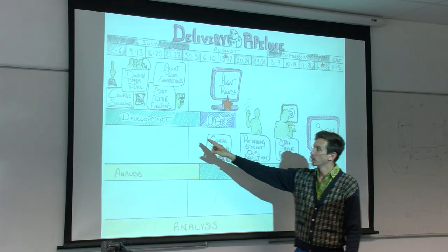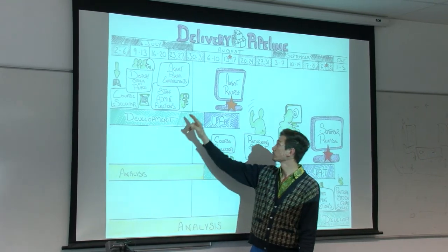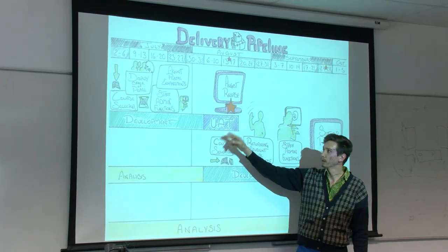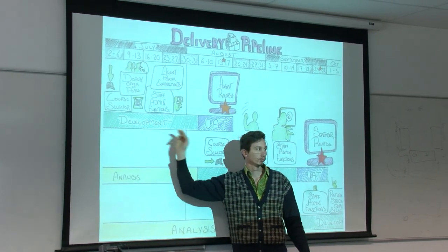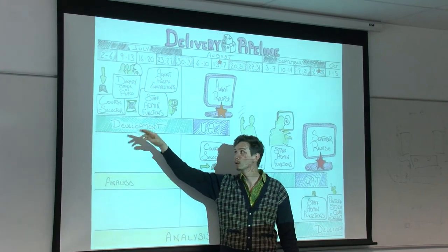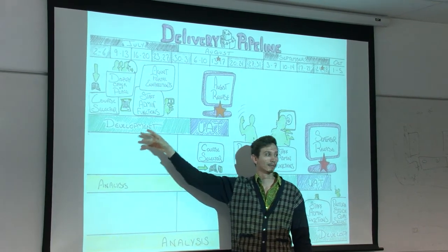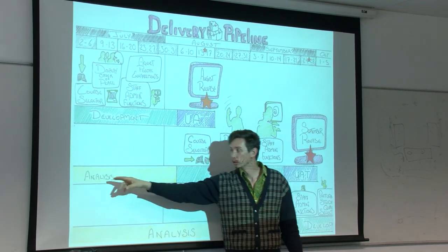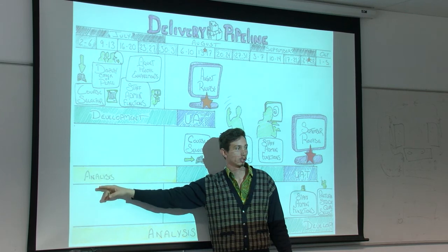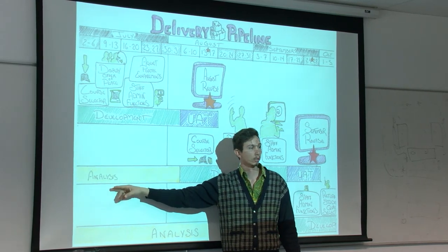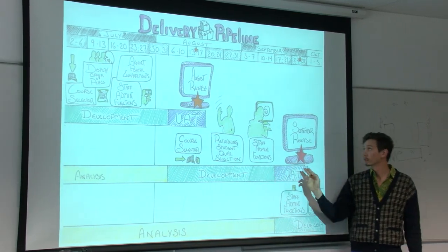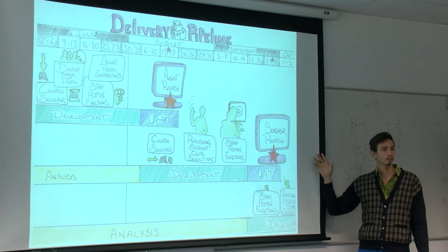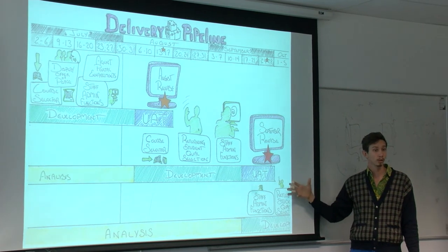As this August release, which is where that orange star is, is tracking through and the development team is working on the priorities that we want to develop and deliver for August, the business analysts are talking to you about the priorities for the September release, which should get us prepared for what you need in the business for October.